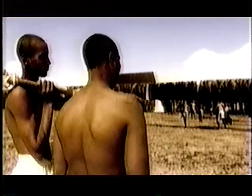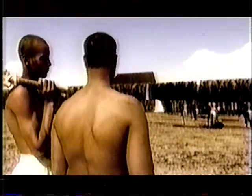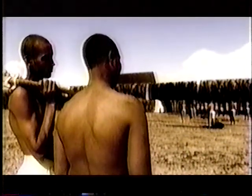Like modern work plans with tight budgets and hard deadlines, Craig's figure of 40,000 was based on the minimum number of workers required to complete the job in the shortest amount of time, a span of just 10 years. But the historical evidence suggests that each of the pyramids was built during the reign of one king, approximately 20 years. With double the amount of time, Smith concluded that each pyramid could have been completed with far fewer workers. His maximum workforce for the Great Pyramid was something on the order of 40,000, but perhaps it could have been done for somewhere as low as 20,000.